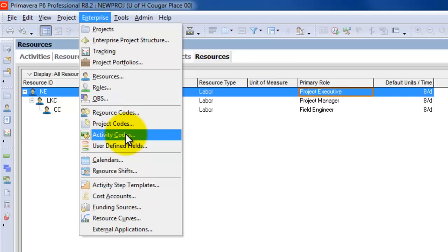And activity codes are similar to a work breakdown structure but they're not the same. Activity codes are, I'm going to call it the layman's term on how to sort and break down a project into smaller components. Work breakdown structure, and I'll show you in just a little bit. Work breakdown structure, as you build a schedule, will automatically prepare, and it will do it in terms of site work, structure, foundation, exterior skin, those major components that are generally accepted in the construction industry.